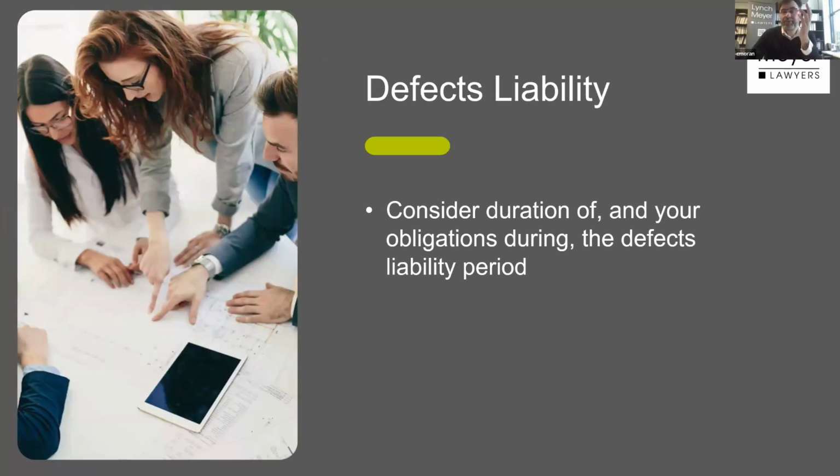Defects liability period, standardly about 12 months. If there's anything funny in there that you think looks odd, raise that.